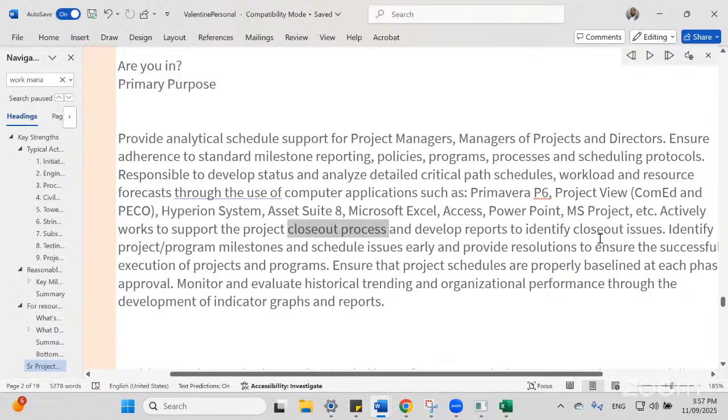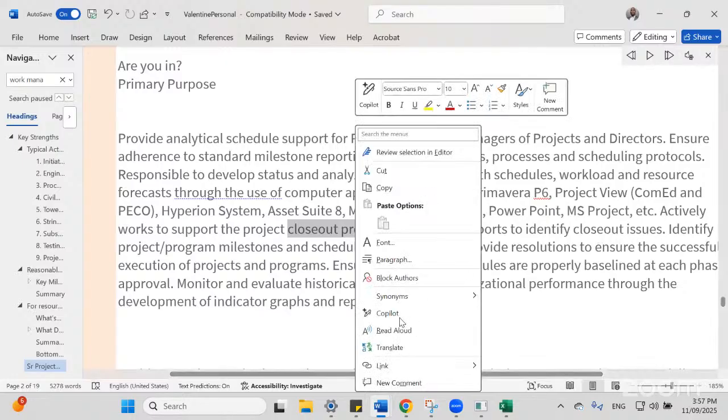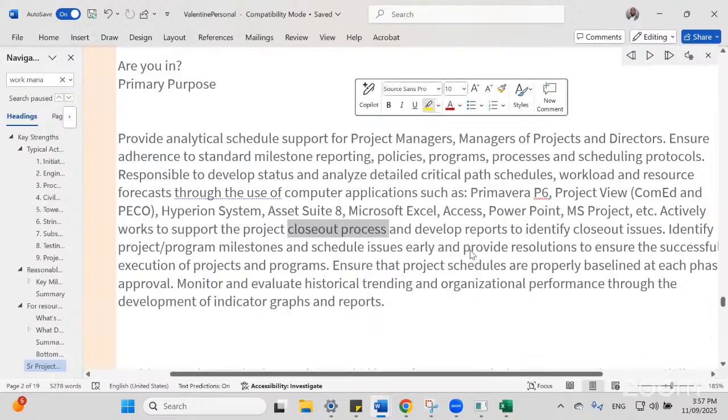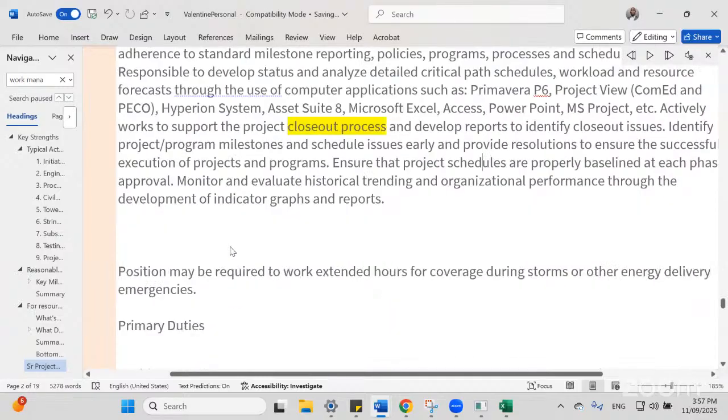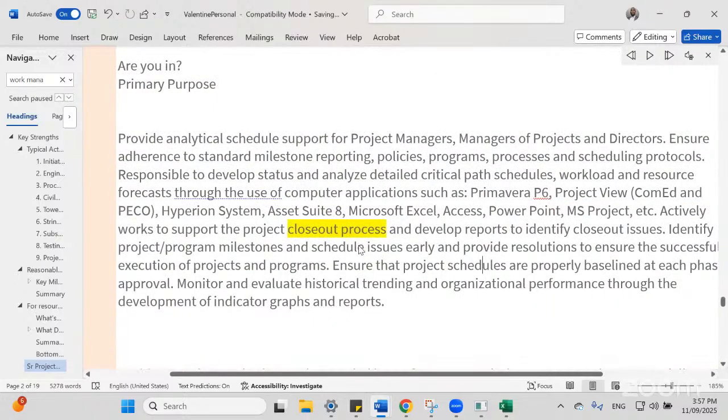All electrical MEP items, MEP means mechanical, electrical, and plumbing items, we need to test and commission. Then we have to collect all necessary approvals from local authorities like firefighting, electric connection, water connection.